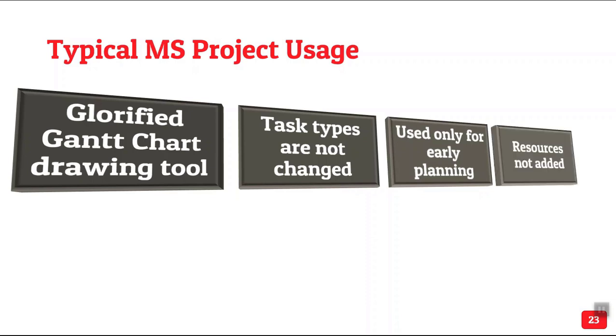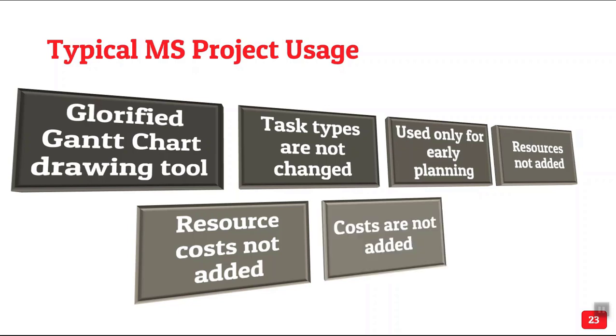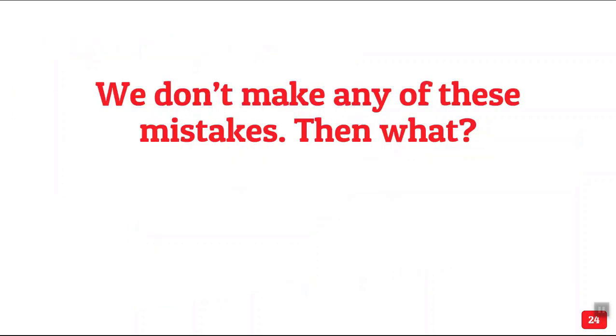And then generally it is used for planning because it's under the control of PM. But when it comes to managing people, again the same problem. If you add a resource name, that resource doesn't know project manager is blocking my time for one week for this project three months down the line. Resources are added, but how much the resources cost is typically not added. Costs themselves like travel, stay, transport are not added as tasks. And baseline is very rarely saved. Even if it is saved, we should have up to 11 baselines and interim things which are not done. Bottom line, even if you are using MS Project, you are not using it optimally.